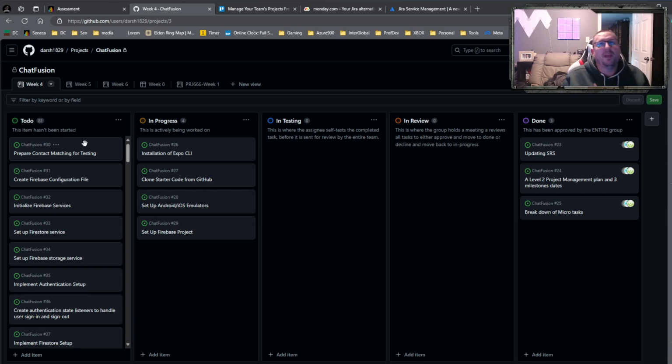It's been approved that we're going to do it. We create the issue. We promote it to a task. It goes into the to-do status. Okay? We then have our weekly meeting with our group members, our team, and we say, okay, these are the tasks we need to do this week.